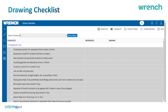While a document is sent through a workflow, you can specify checklists against each stage. For the designer you can have a set of checklists, and you can have different checkpoints for a reviewer and for an approver. This ensures that every document is reviewed against predefined checks before it is sent, so your drawings are kept absolutely perfect on an ongoing basis.